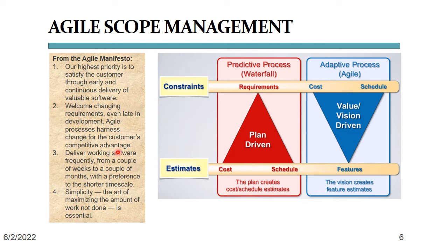And indeed, at any point in an Agile project, anyone, the Scrum team, stakeholders, or anyone else in the organization with a good idea can identify new product requirements. The product owner determines the value and priority of new requirements and prioritizes those requirements against other requirements in the product backlog. During sprint planning at the beginning of each sprint, the Scrum team can use the product backlog priority to help decide whether a new requirement should be part of the sprint. Lower priority requirements stay in the product backlog for future consideration.